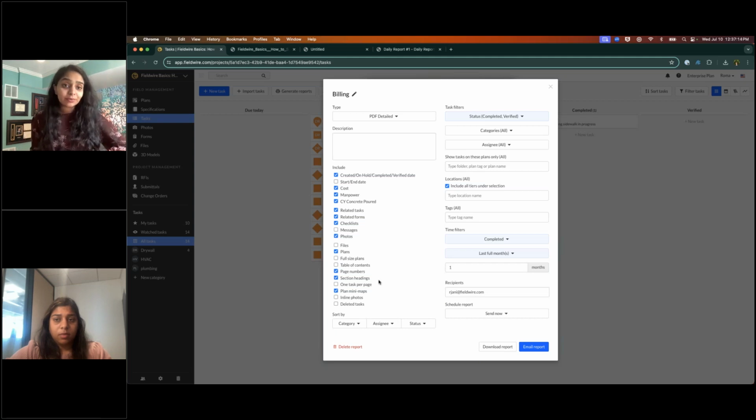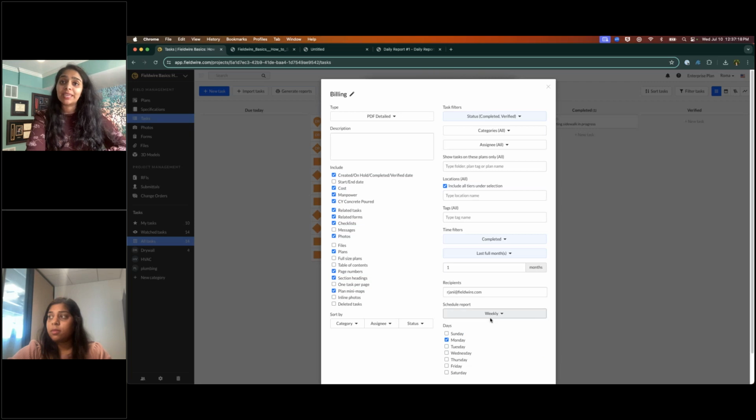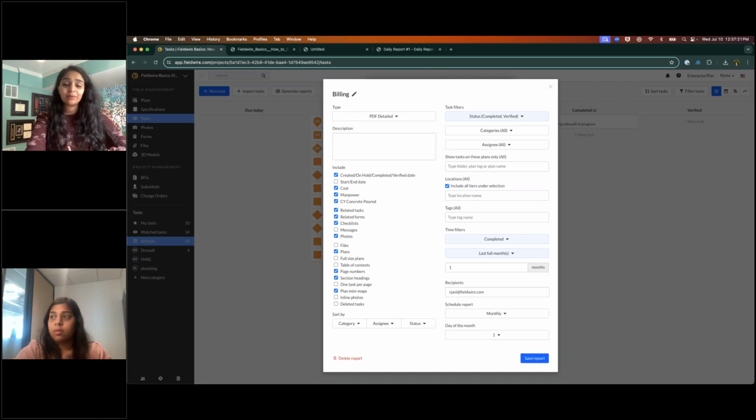And what it'll do is it will run this report. I can even schedule it to be sent to myself or my accounting team every month. And that way they know, okay, we can bill for these are completed. This is great for punch listing as well. Hey, this is what we completed, or this is what we found on this day on this walk.